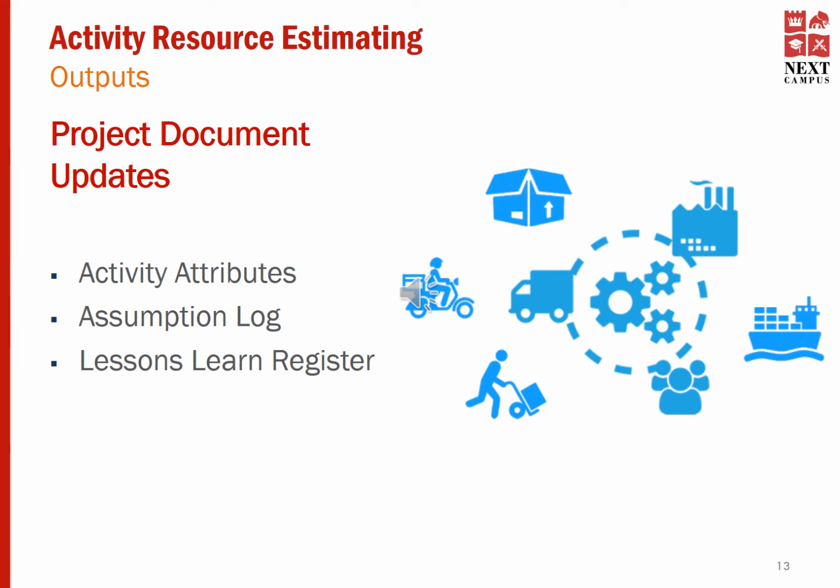An assumption log is created during project initiation when forming the business case, and the content will be used in the project charter. At this stage, high-level assumptions are used. Low-level assumptions based on the tasks and products are created during the project life cycle, and the assumption log is maintained and reviewed throughout. Assumptions are made throughout the project in order to be able to proceed with activities. But these assumptions can generate a risk or an issue if the assumption is found to be untrue.